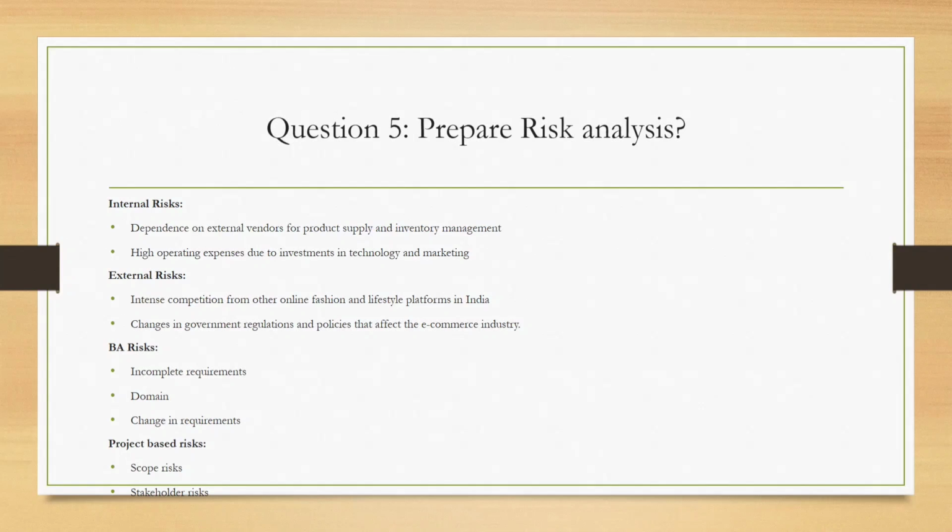So this is a big risk for us. For example, the budget is only 1 crore and we need to complete it within 1 crore. If a change request comes in between, the budget will increase and the timeline will also increase.